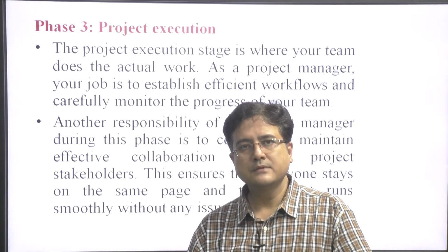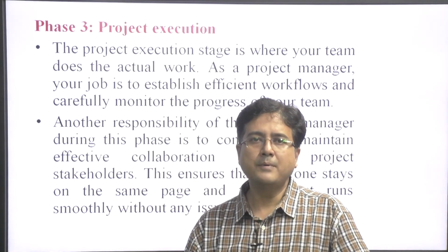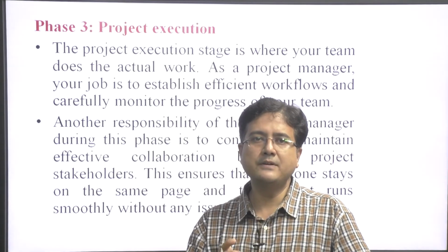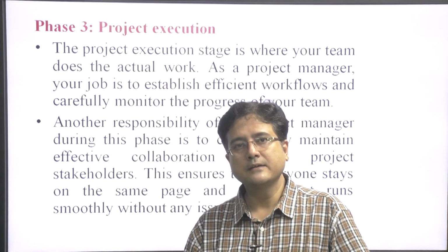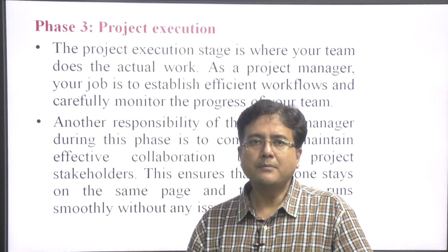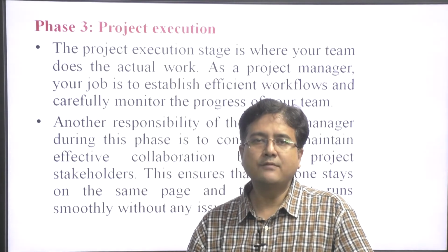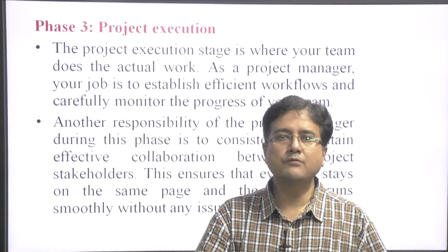Many times a time gap arises between planning and execution. In this gap, due to inflation, the cost of material sometimes increases, our expenses exceed the budget, and we have to stop the project.